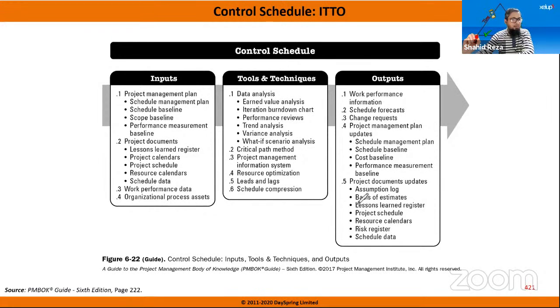That's why in Agile practices, there is no mention of Gantt charts, bar charts, or critical path things. So how are they going to meet the deadline then? They follow the iterations. Say they have a deadline, they have to finish this by December. So they break down the project into releases, and work out how many iterations they need for each release.